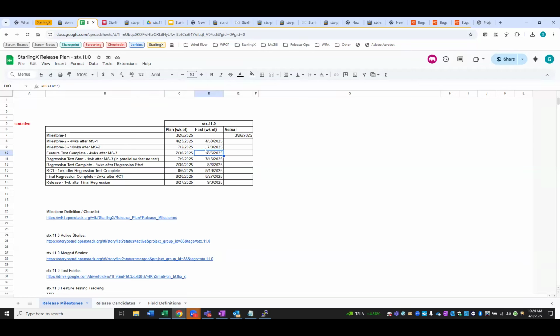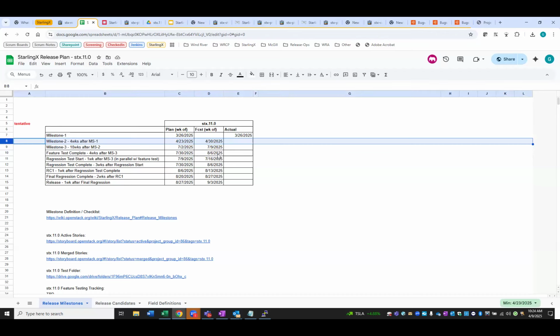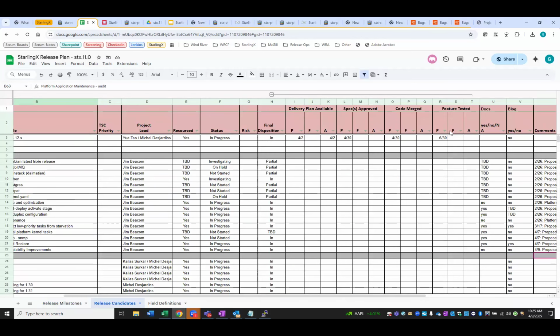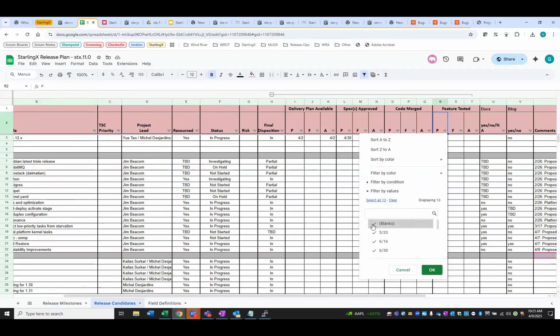I want to also talk about milestone 3, but I think we'll talk about it when we have more dates. It's all about percentages. If 90% of the features will be ready by July, or some number that we're comfortable with, then we'll keep milestone 3 at this date. If not, then we may need to consider. I'm going through this because I know that not everybody here comes to the release planning meeting, so I'm just trying to share some of the logic that we apply.